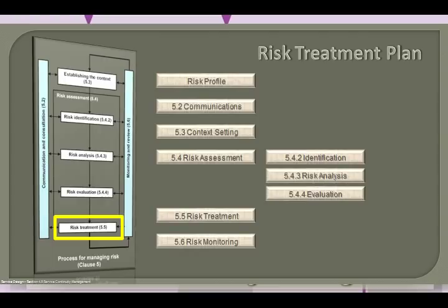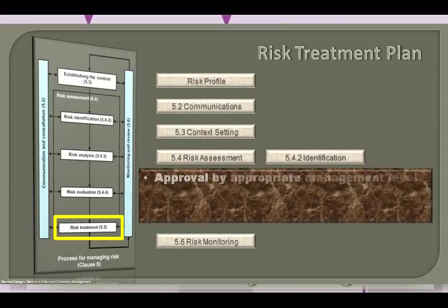Risk recommendations should be considered together in a risk treatment plan that documents the decisions about how each of the identified risks should be handled and considers the interdependencies amongst them and their treatments. Risk mitigation needs to be approved by the appropriate level of management. For instance, a risk concerning the image of the organization should have top management concern behind it, whereas IT management would have the authority to decide on computer virus risks.